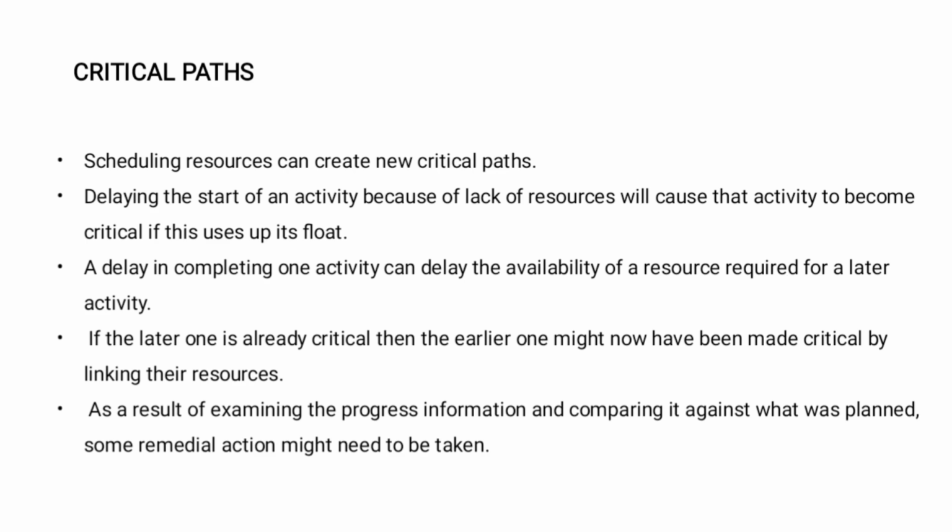Scheduling resources can create a new critical path. Delaying the start of an activity because of lack of resources will cause that activity to become critical if this uses up its float. A delay in completing one activity can delay the availability of the resource required for a later activity. If the later one is already critical, then the earlier one might now have been made critical by linking their resources.